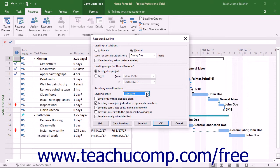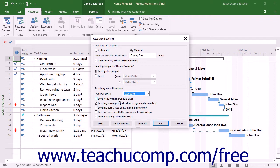To let the leveling only use the available free slack in a project file, check the Level Only Within Available Slack checkbox. This choice is most often unchecked to let Microsoft Project extend the finish date of the project to resolve overallocations.